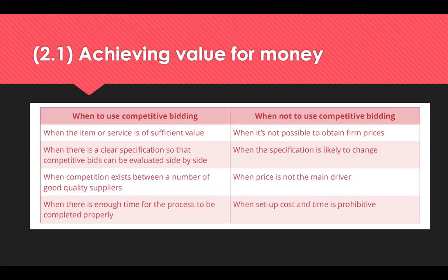And you need enough time to conduct that process competently and properly, because it takes a long time to digest information in a tender, and you need enough time for the suppliers to respond and enough time to evaluate. So it's not going to be a quick process. But don't use it if you don't think it's possible to establish the baseline or the budget accurately, if you think the spec's going to change, or if price isn't the main driver.